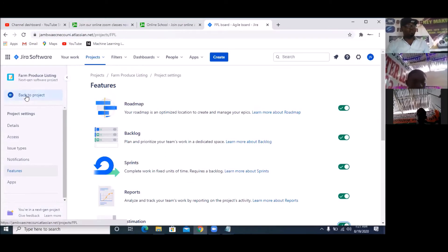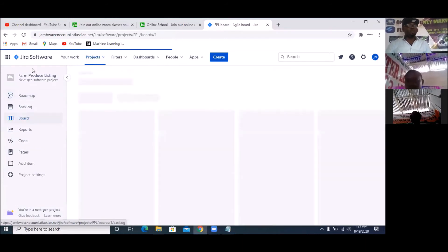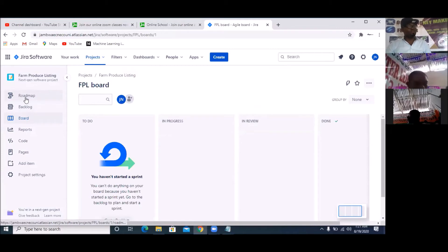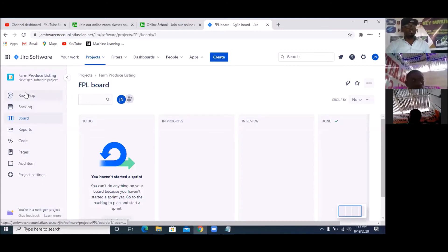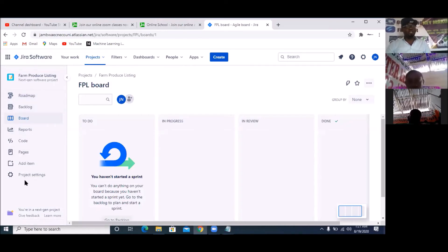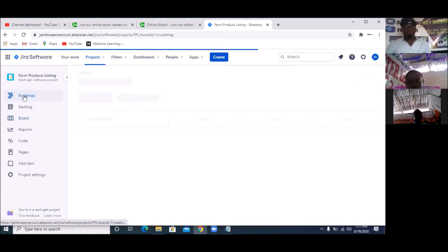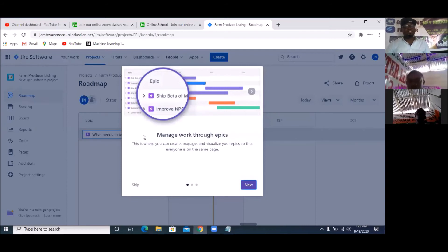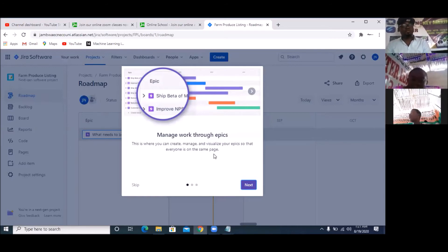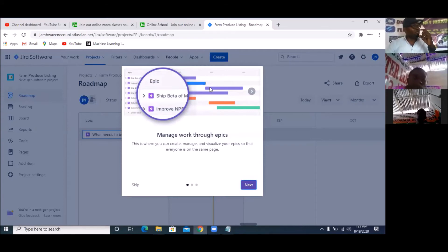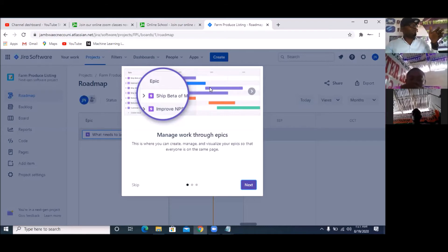Next thing is to go back to your projects, then go to Backlog. You can either do Roadmap first or you do Backlog — but let's do Roadmap first so things are in line. When I click on Roadmap, it's telling me that Roadmap manages your epics — this is where you can create, manage, and visualize your epics so that everyone can be on the same page. What Roadmap does is present the timeline of your project with dates — specific milestones you want to achieve shown with dates in a chart known as epics.